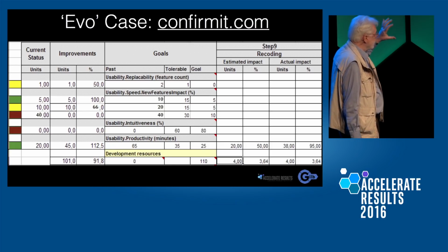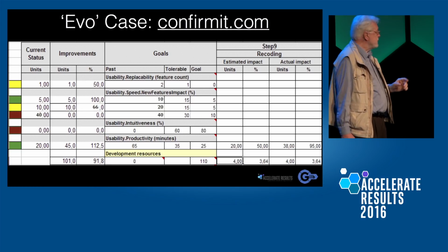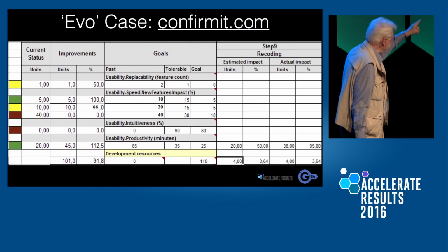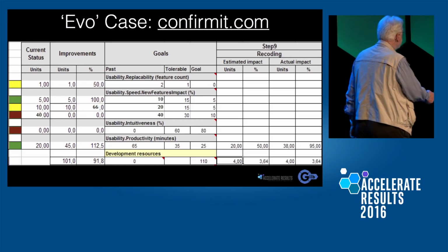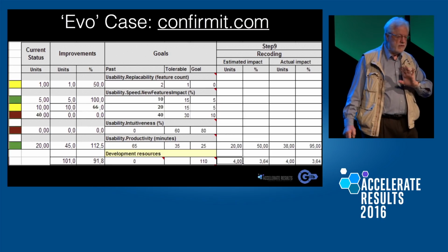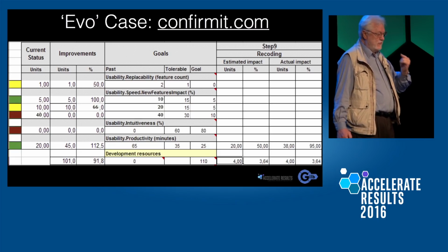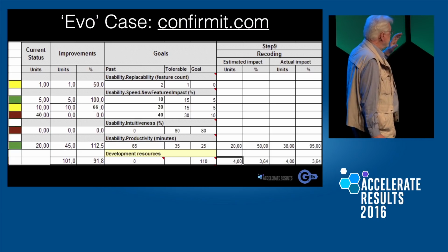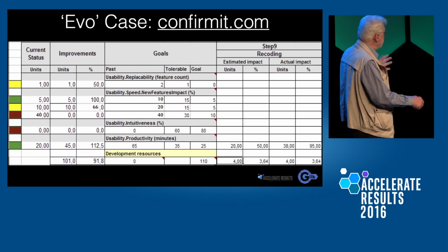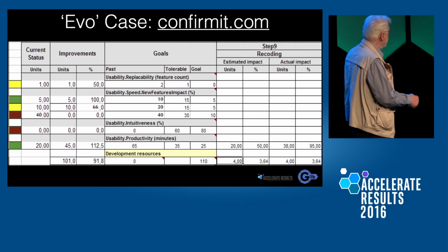This is 1/4 of them taken by a team of 4 people to work on, with the agenda to try to deliver the goal levels. I wonder if this is, deliver the goal levels by the end of a quarter of a year. So every quarter of a year released to the world, the product. But every week, 12 weeks, they have an agenda of attacking, in a sense they've decomposed. They said, we have 1/4 of all the goals, our team. There are this many, 5 or 6 different goals.